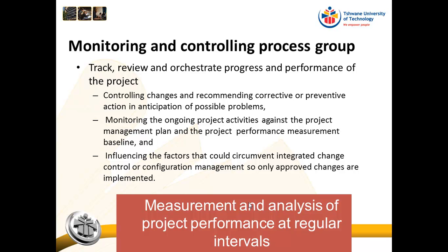So it's about controlling changes, recommending corrective or preventive action, and anticipating possible problems, monitoring the ongoing project activities against the project management plan and the project performance measurement baseline, because remember the plan will give us all of that, and then influencing the factors that could circumvent integrated change control or configuration management so that only approved changes are implemented.